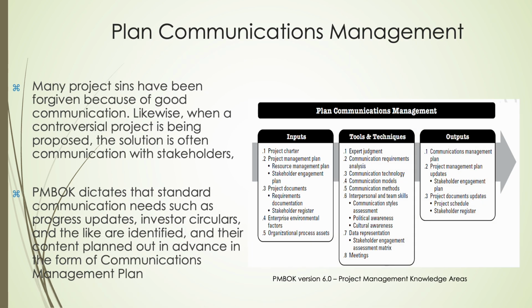Planning communications management is a critical process that determines how project information will be collected, created, distributed, stored, and ultimately disposed of. It uses inputs like the project charter, project management plan, and project documents, including requirements documentation and the stakeholder register. Tools and techniques such as expert judgment, communication requirements analysis, and communication models help in designing the most effective strategy for keeping stakeholders informed and engaged throughout the project.